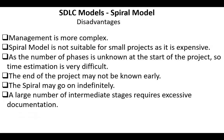However, the spiral model has the following disadvantages: management is more complex, not suitable for small projects, and in most cases it's an expensive model. As the number of phases are not known at the start of the project, time estimation is very difficult, so the end of the project may not be known early. The spiral may go on indefinitely, and a large number of intermediate stages requires excessive documentation.